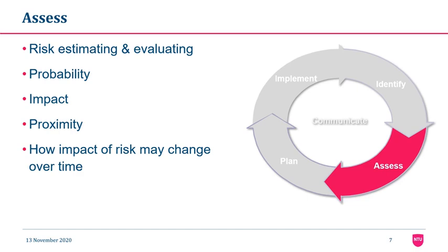Another point to clarify is the risk scale. Scale is the grading criteria for each risk, that is, for the probability and severity score. For example, we can say the impact is very high, or high, medium, low, and very low. Or we can use, for example, a scale of 1 to 10, 1 to 5, or we can use traffic lights.